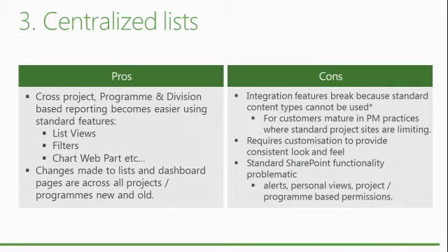Excellent. And then you can use things like the chart web part, which is a lovely new feature they added in 2010, standard edition and up. You can then graph and do pie charts of your risks based on project, program, or division. Suddenly we can start to create dashboards that resemble highlight reports, which you can use to report to your management, who really wanted you to implement these kinds of solutions so that they can get true data and compare apples and apples across your divisions.